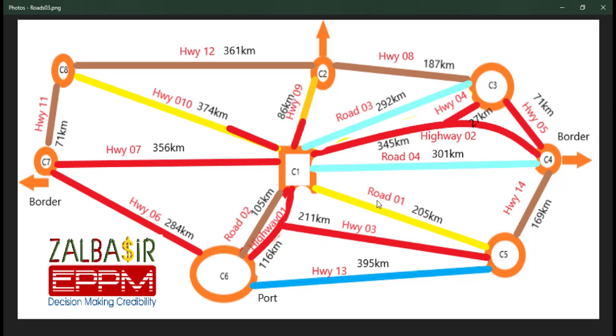The decision in the previous planning is that we don't want to disturb the current heavy traffic on the existing roads by upgrading them. We need the traffic to be smooth so the economy will not be impacted. And because the terrains allow us, we decided to go with new highways in greenfield areas to develop more areas, also as a strategic planning to expand the population and not have it concentrated around these existing roads.